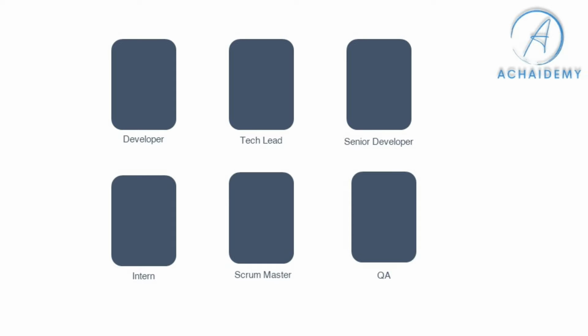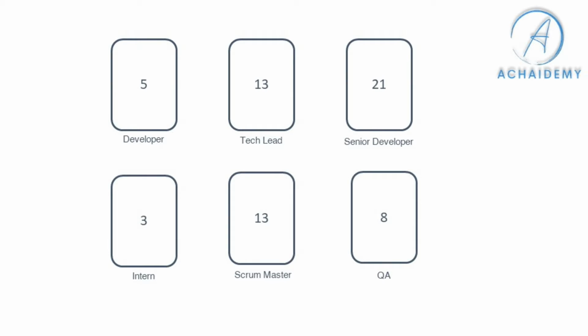So in this scenario, assuming the user story is discussed and everybody is clear, once the developer and everybody gives their effort, all the efforts are displayed together. If you see in this example, there is not much consensus: the developer says it's comparatively medium complex, but a scrum master or tech lead says it is a bit more complex, and maybe a senior developer thinks it's completely complex.